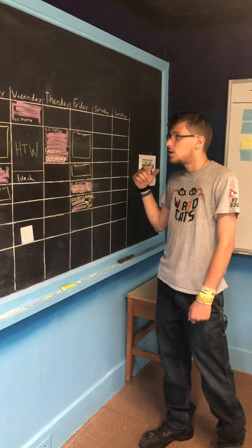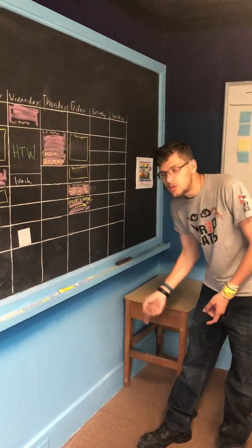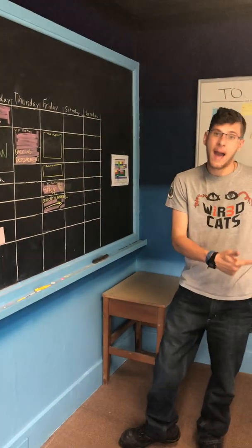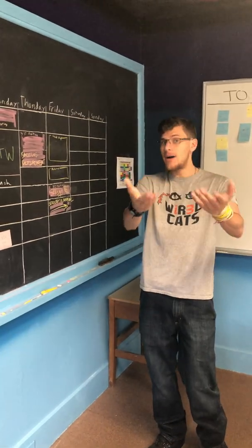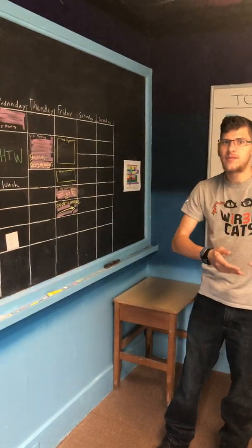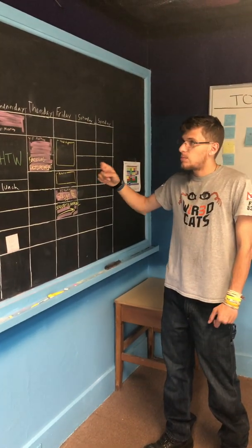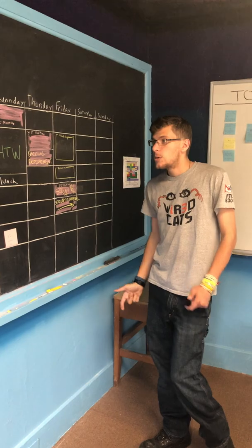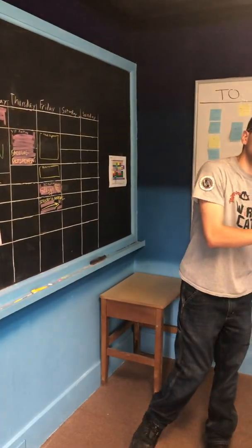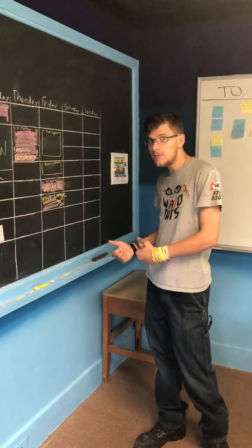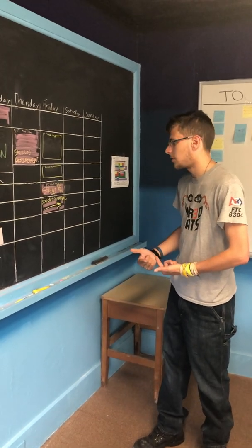We're doing sprint review, which is where we go back over what happened this week. We do what I'm doing now, send you guys a video of how the week went and what I got done that week. And then we do a sprint retrospective, which is how well did this last week go and what can we do to improve and make that more efficient in the future.